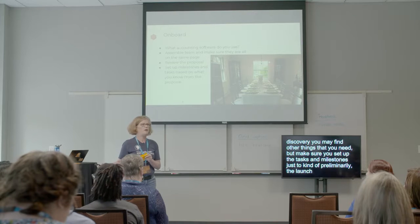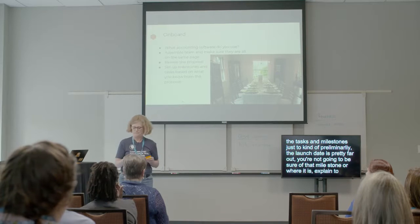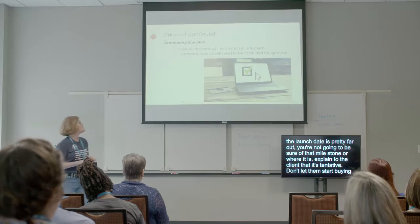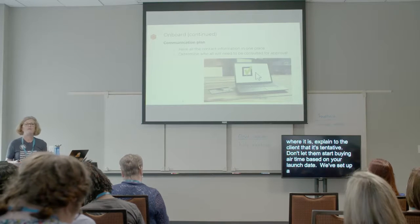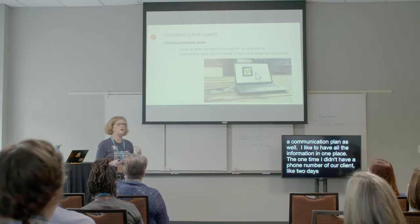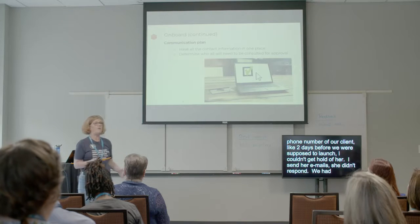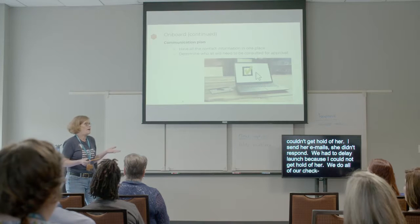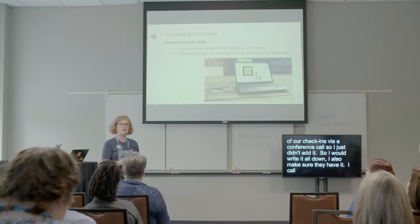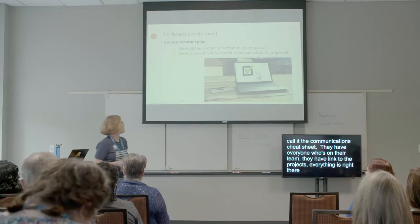At this point, I set up my milestones and tasks based on the proposal. This may change. As you go through discovery, you may find other things that you need, but make sure you set up the tasks and milestones just kind of preliminarily. The launch date is pretty far out. You're not really going to be sure of that milestone and when that is. But set it up and explain to the client that it's tentative. Don't let them start buying airtime based on your launch date.